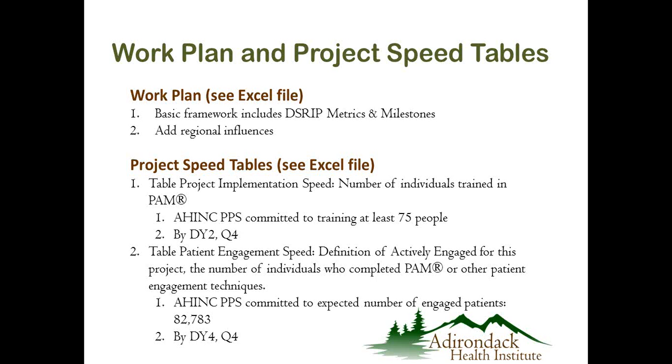So back in January, we had to submit some speed and scale information, and at that point in time, we indicated that all of the various organizations that are taking part in Project 2DI would in fact meet all of that project's requirements by the end of DSRIP year 2, which is actually by the end of 2016. So DSRIP year 2 would be the same as calendar year 2016.